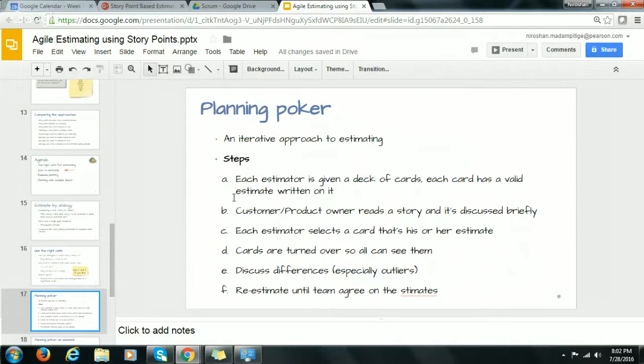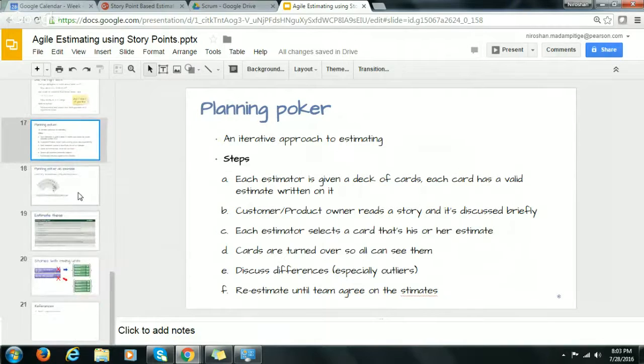Everyone listens to these justifications and then goes for another round, the same way. The next round of estimations will probably be adjusted based on the justifications that everyone heard. Even if it doesn't give you a common ground where most of the team agrees on a common figure, then you go for another round. There's no harm. You could do this until you get the agreed numbers. Generally, with a maximum of 3 attempts, teams are able to get to an agreed figure. That's the maximum that I would say you should do. Then move on to the next one.